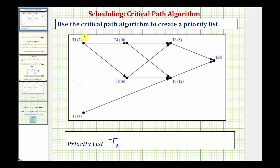We had several paths from task one that took a long time. Going from task one to task six, to task seven to the end, is two plus six plus 12, or 20 hours. But if we take the path from task one to task four, to task seven to the end, that takes two plus ten plus 12, or 24 hours. From task three, we only have one path — task three to task seven to the end — which is only 16 hours. So this path is our next critical path, and therefore task one is next in our priority list.